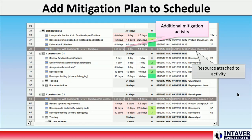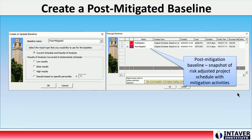Then we perform a Monte Carlo simulation on the updated plan. Once we have run the simulation, we now create a post-mitigated baseline using the mitigated schedule. It is a snapshot of the risk-adjusted schedule with mitigation activities.